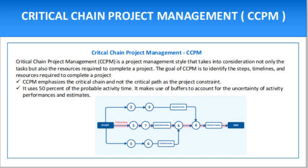A major problem with critical path project management is that while it works in theory, it fails to consider that in the real world you do not have unlimited resources. On your shop floor, you only have so many workstations and staff members, and you also have real-life constraints and bottlenecks that determine how much work can be completed. CCPM takes these factors into consideration to create a more holistic and realistic schedule. The critical chain is the longest path in the schedule and considers activity interdependence and resource constraints.